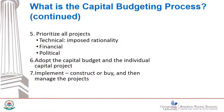Sixth, the governing or executive authority has to approve the purchase of items in the capital budget. Implementation, the seventh step, entails the purchase or construction of each capital project. Once it's obtained or built, you have to operate and maintain it, which is a burden that will fall on future annual operating budgets.